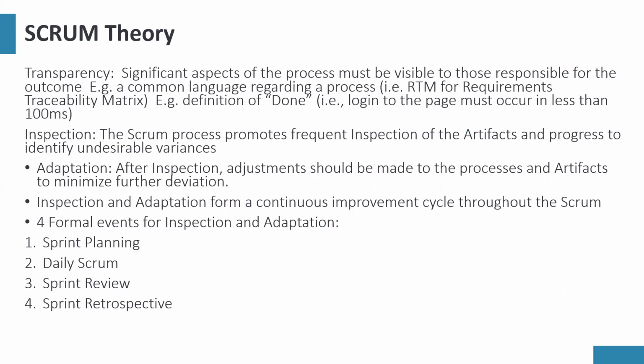And in Scrum, you notice that Scrum is also based on empirical process control, empiricism, and you find out that there are some things that talk to transparency. So in Scrum, things that pertain to transparency are your product backlog, because the product backlog helps to show the work that needs to be done, the sprint backlog, and the definition of done.